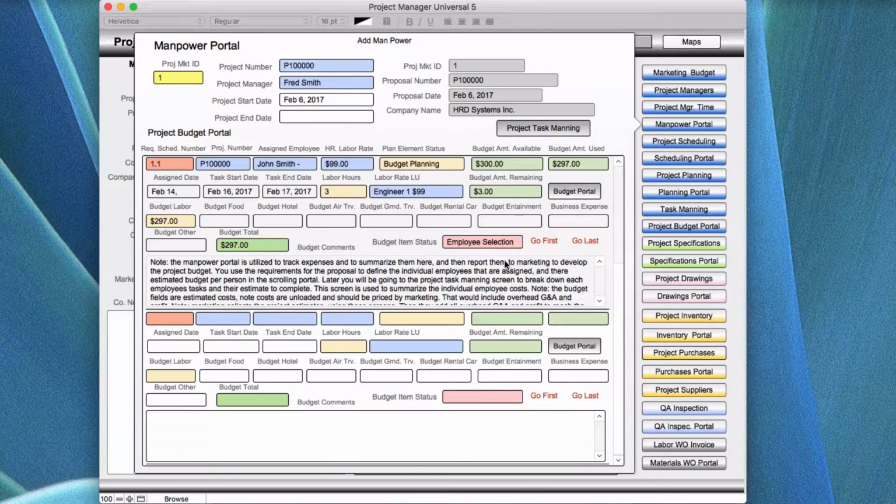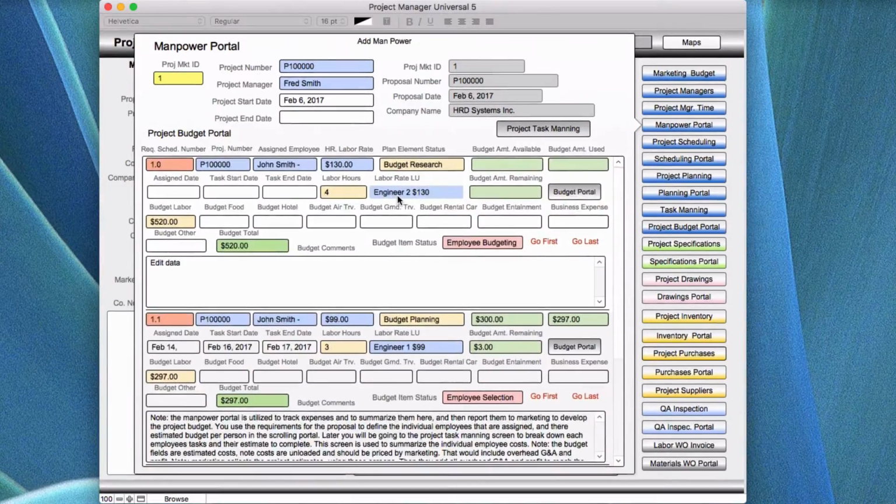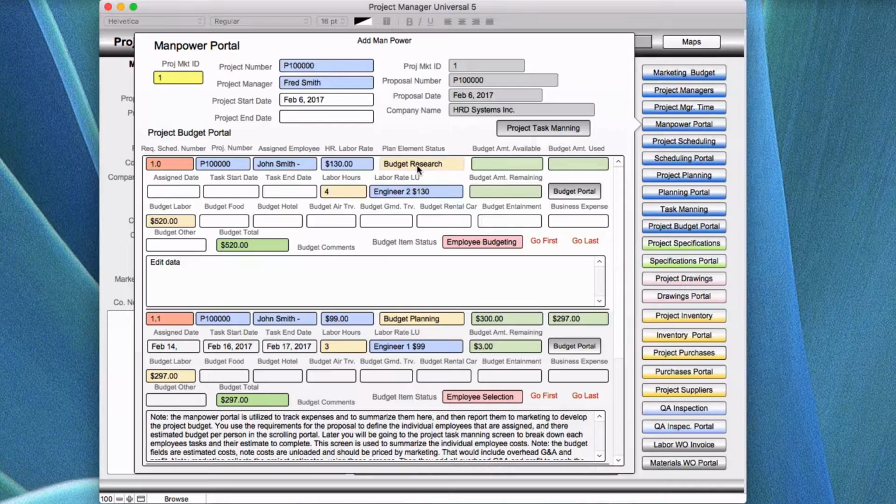One of the things involved at the very top of this is the manpower allocation. You're looking at each individual who's going to be working on that project, and you're going to get an estimate based on their expertise for what they're doing. In this case, most of the first things I'm putting in here are about working with the proposal, budget planning and research, and you pick the person or people involved who have the education and background to quote correctly what the process is going to take.